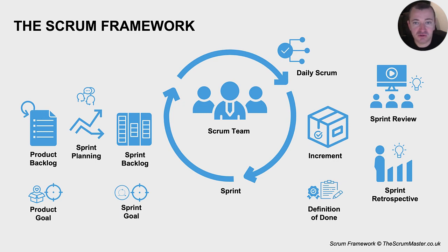Scrum teams are cross-functional and have all the skills needed to develop the product. They are self-managing and internally decide who does what, when and how. The Scrum Master is accountable for the adoption of this empirical approach and the use of Scrum. They help remove impediments to the Scrum team completing its work effectively. They help the Scrum team become more able to deliver valuable, usable, done increments and are accountable for the team's